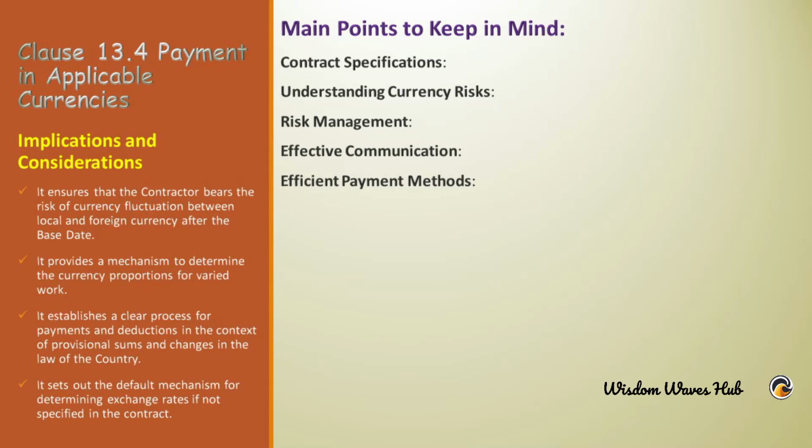Risk management. Consider the potential impact of currency fluctuations on the project's cash flow and profitability. Implement risk management strategies such as hedging or forward contracts to mitigate currency exchange risks.